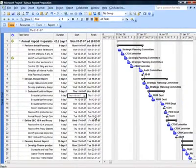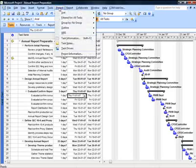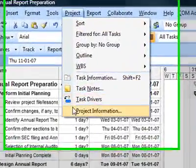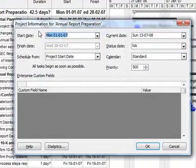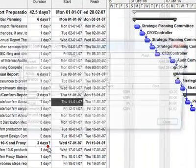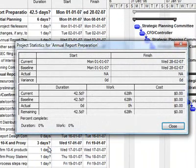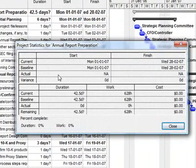To see the impact of the baseline, I will go to Project, choose Project Information, and click on Statistics. Currently the baseline and the current values across start date, finish date, duration, work, and cost are absolutely the same. This is because we have not updated progress information or any kind of delays in our project.